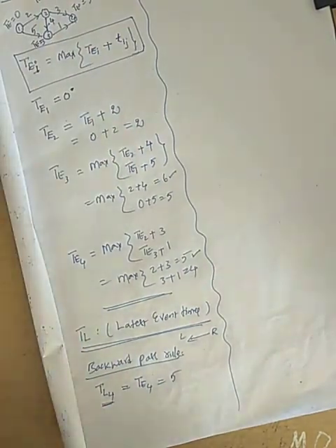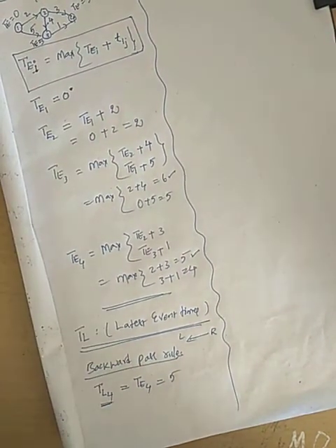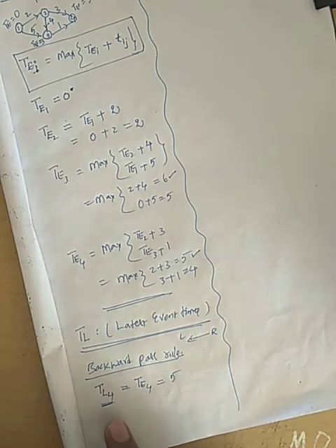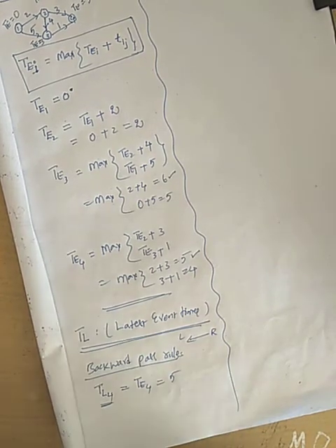This is a very important point. Starting values. In the TE calculation, the TE value is 0. Same way, in the TL calculation, the last TE value becomes the TL value. Last TE value is TE4. It becomes the TL event. How much is that? 5.